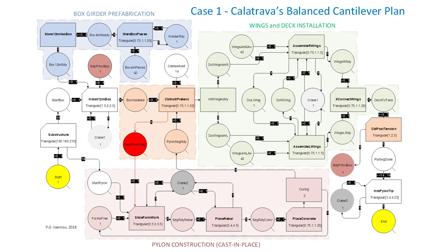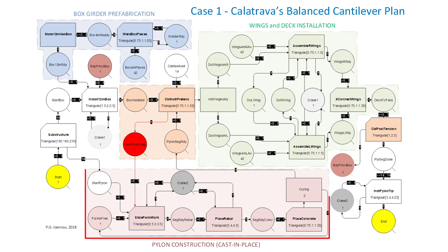Shown here is Case 1, the Easy Strobe model for Calatrava's original balanced cantilever plan. The Easy Strobe model corrects the corresponding Cyclone model by adding a feedback loop highlighted by the red queue and two red links. The absence of this feedback loop in the Cyclone model is a significant modeling mistake that allows one pylon segment to be poured right after another without waiting to connect each pylon segment to its corresponding deck segment to maintain bridge stability — thus allowing pylon construction to significantly outpace deck construction. The purpose of this feedback loop is to prevent construction of the next pylon segment until the previous one has been connected via stay cables to the corresponding deck segment.